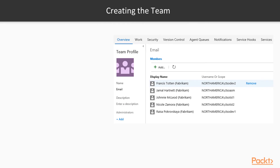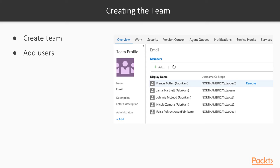Creating a team in TFS is really straightforward — you create a team from the dialogue. You'll need higher permissions to do so; not everybody can just go in and create a team. This is more of a project admin role, specifically a TFS project admin who has the ability to add new users to the system. You don't want just anybody adding users, so permissions are important. We can go into security and look at the permissions that group or person has and dial them up or back as necessary.